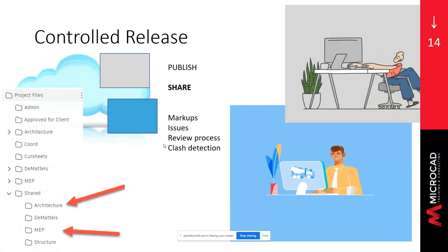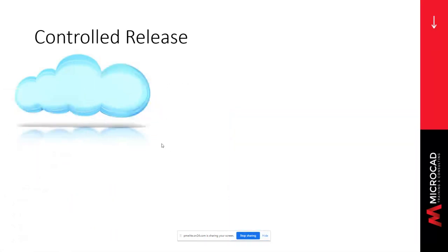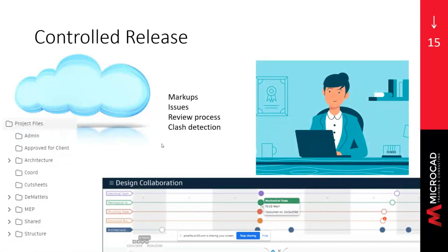What is different is that Jeff's linked file is updated when Oscar shares the model. In the previous example, it was when he publishes. This gives stakeholders an opportunity to review and comment on the published design before Oscar shares it. And Lee has the ability to look at the models and use any of the collaboration tools we've discussed previously.